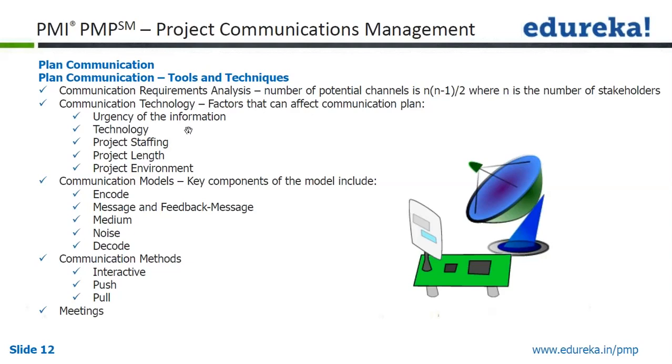Project environment is also an enterprise environmental factor. I mean, do you have email? Do you have other things that are requisite technology at your disposal? So let's say you want to conduct a video conference, audio conference. Do you have that kind of technology available with your organization? That will limit what you can use in your communication plan.